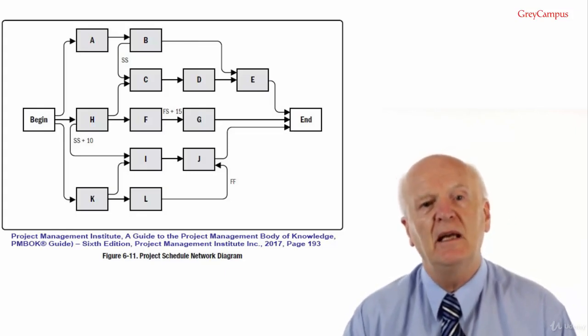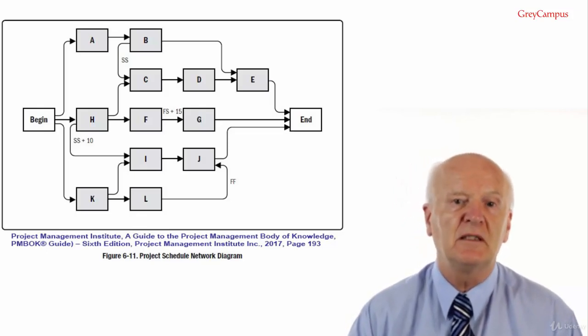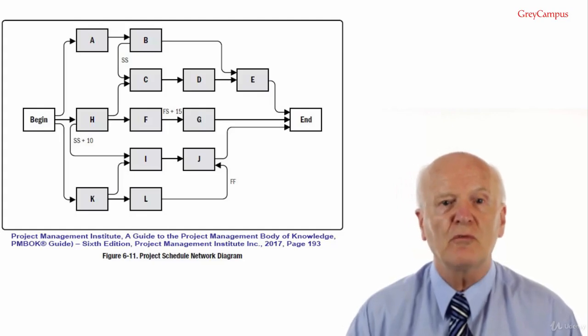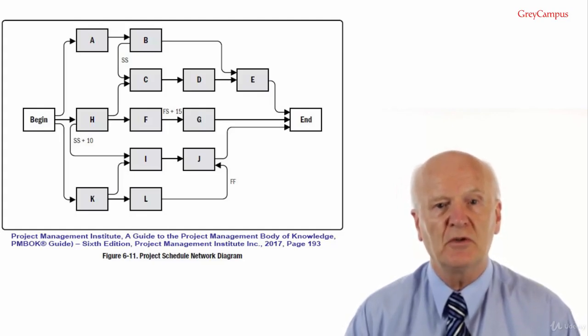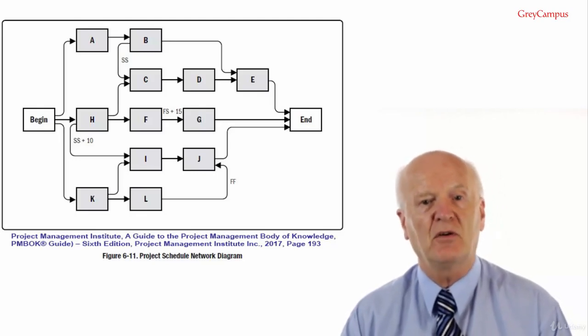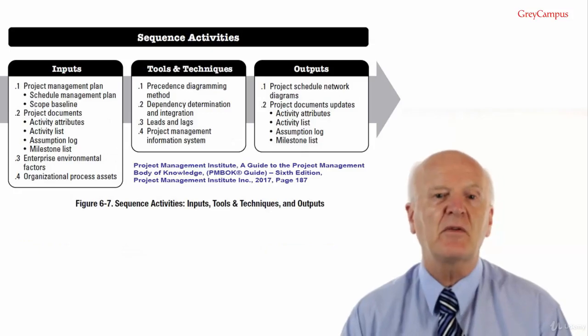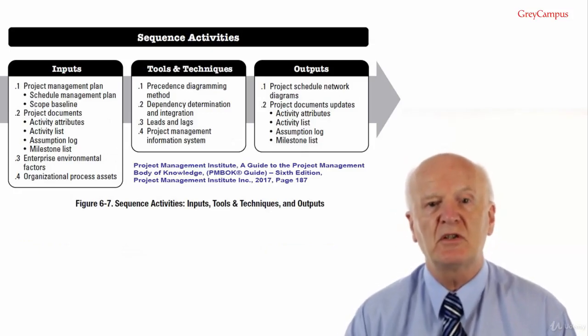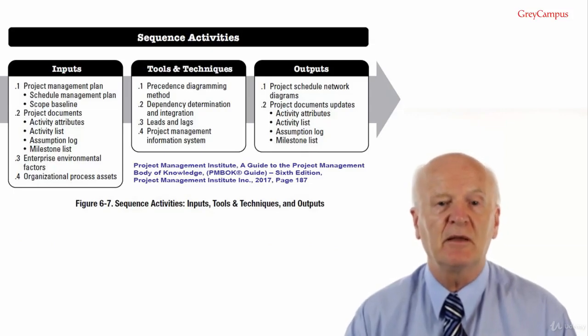Activities and their related assumptions should be documented. For the exam, please remember the use of leads and lags should not replace schedule logic. Duration estimates do not include any leads or lags. Sequence activities outputs. Number 1, of course, is project schedule network diagrams.